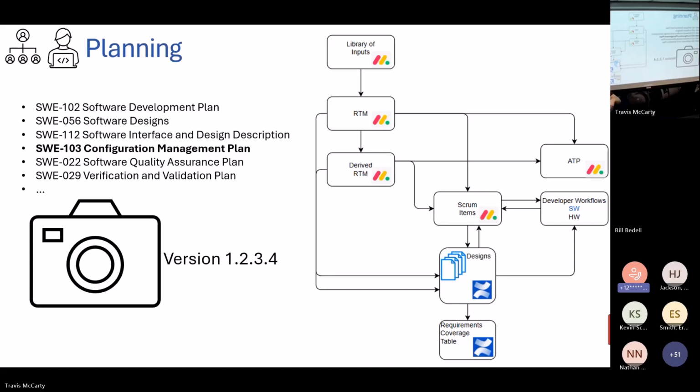Maybe that's a version of a statement of work. Maybe that's a version of your design documentation, 1.1, and everybody can make decisions off of that thing. Maybe it's a version of an executable that you're releasing out into the wild. Maybe it's the entire system, all of the hardware, the BOM, the software that's on it, whatever. Configuration management is a non-trivial task, and typically the outputs are something like a version 1.2.3.4.